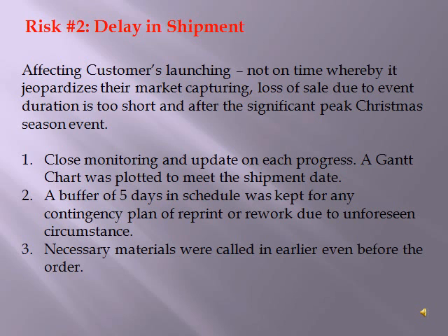Prior to project commencement, a Gantt chart was plotted to indicate each process schedule, and each process status update was closely monitored. A buffer of 5 days in schedule was kept for any contingency plan due to unforeseen circumstances. Raw materials as necessary were called in earlier, even before the order was in.